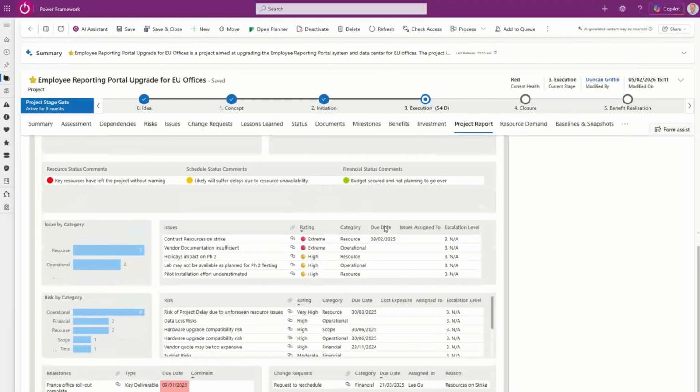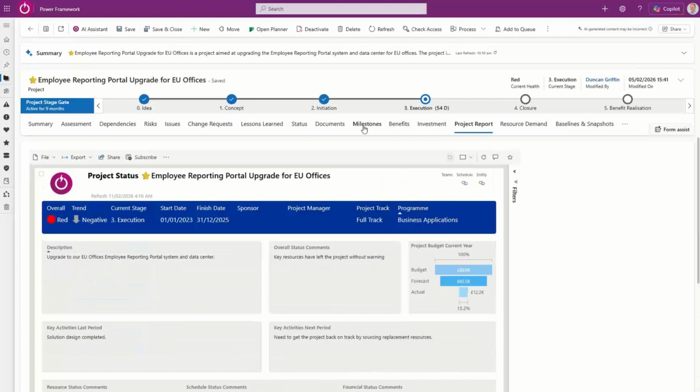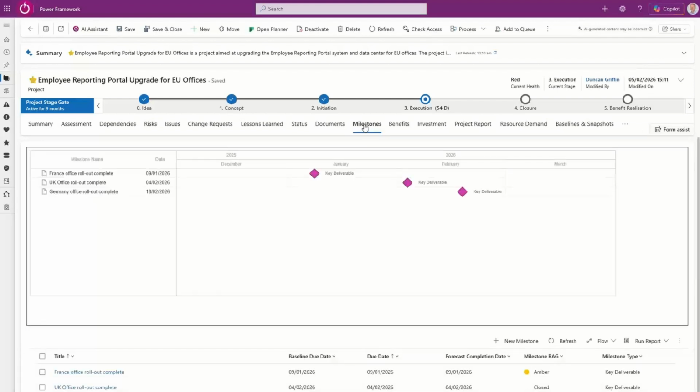And the way that our project plans feed into this is via the key milestones that we're extracting from the Microsoft Project schedule. So you can understand how Schedule Hub for MS Project sits integrated with a wider PPM tool. It's contributing, in this case, milestone information into the PPM tool. But equally, we could build in here the project viewer and so on.